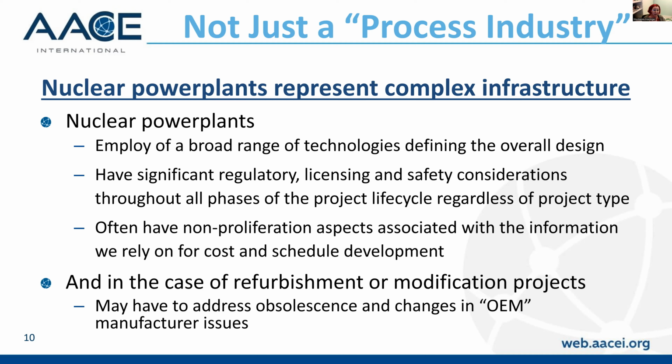It really means that the nuclear industry is dealing with projects that have to, in essence, reverse engineer items to fit a specific safety or performance function. And that really translates from a cost perspective into R&D, and that's not normally experienced in other process industries.